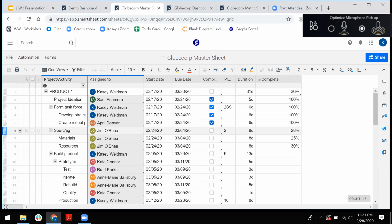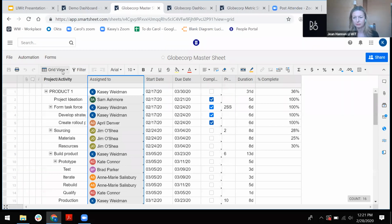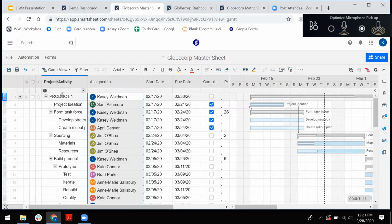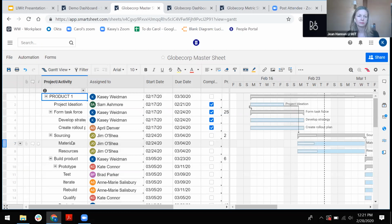Yeah, hi everybody. I think, Stefana, if you're using Trello, you're not going to get that view of the dependencies and the critical path. When you're doing Agile, you might not necessarily need that. If you're just following a regular Scrum process and you have a backlog that you're working through with your product owner, then you may just want to put the tasks up by phase and use this as a tracking tool. I don't know how much value it would necessarily be for you. It depends on really what you need.